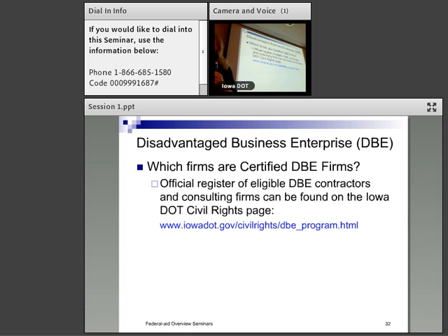there was a spec change. In the past, a prime contractor was required to meet a DBE goal or commit to a contract dollar amount that was equivalent to the DBE goal. If there was a 4% goal on the contract as a whole, then the commitment to the DBE needed to be equivalent to 4% of the total contract value. In practice, that became very difficult to calculate at the very end to ensure that that commitment had been met.